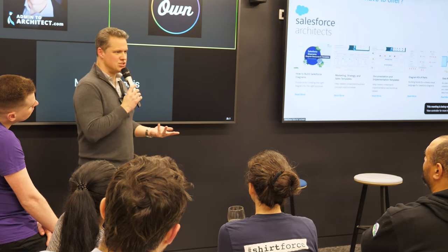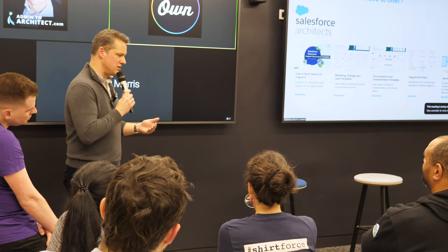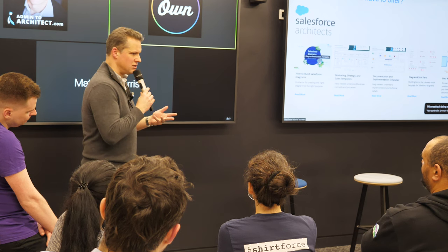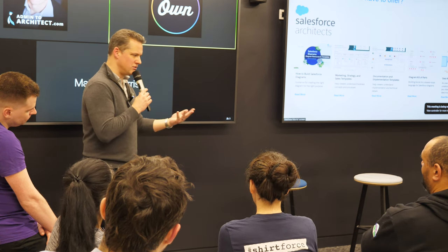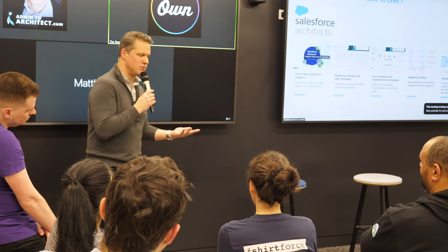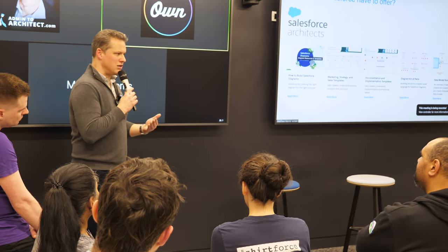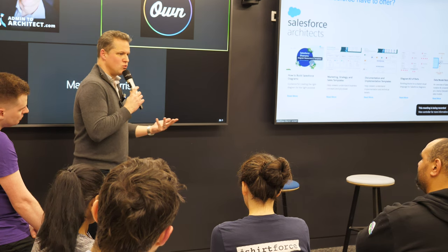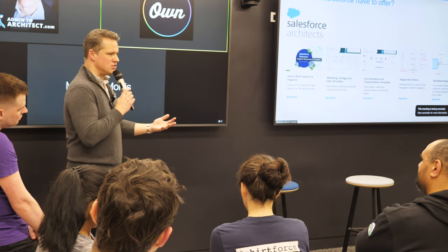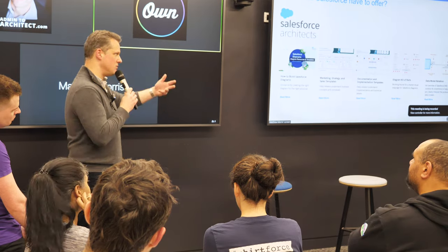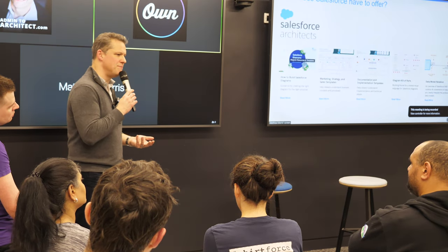In terms of keeping versions, it's always good, I think, to have things at particular checkpoints. Sprint's probably too much, I don't have time to update everything at sprint level. But certainly within work packages, so like quarterly: here's what we plan to do, here's what we actually did. You can do a retrospective on some of this, right?